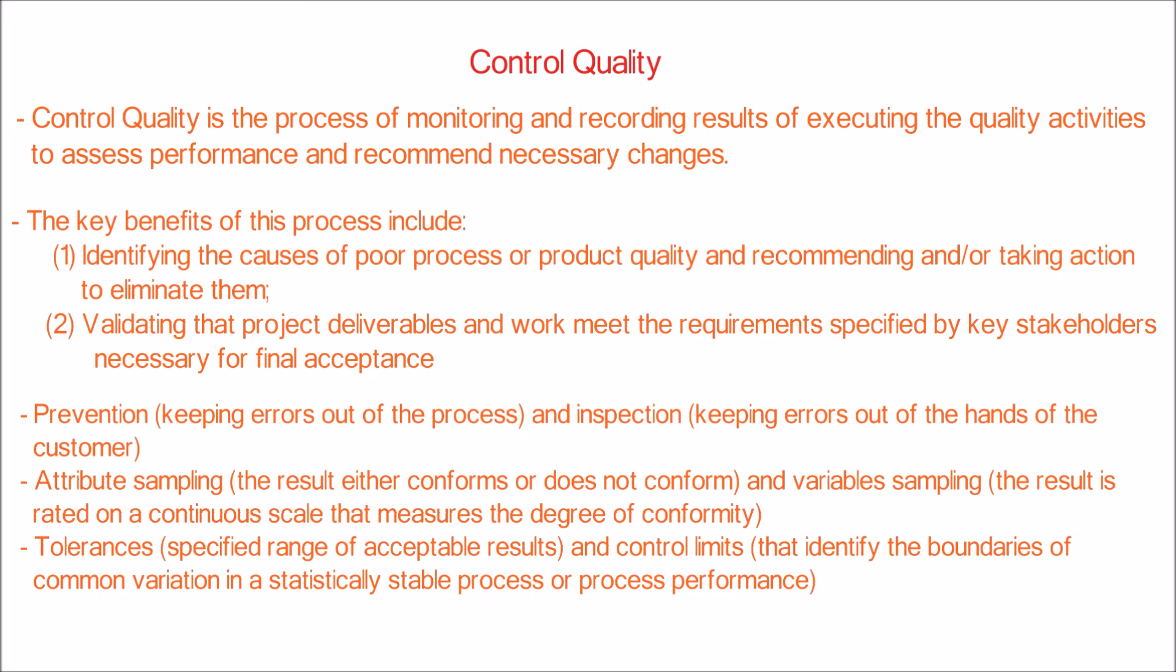The selection of samplings can be either attribute sampling, the result either conforms or does not conform, or variable sampling, the result is rated on a continuous scale that measures the degree of conformity.